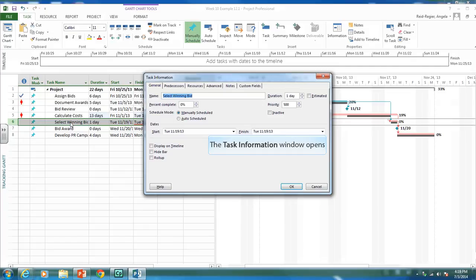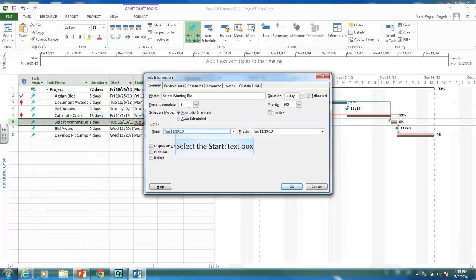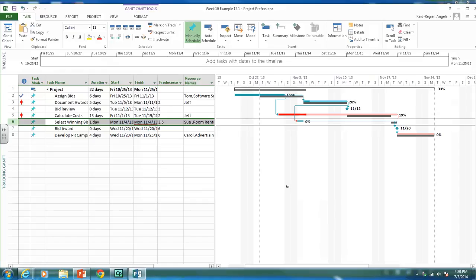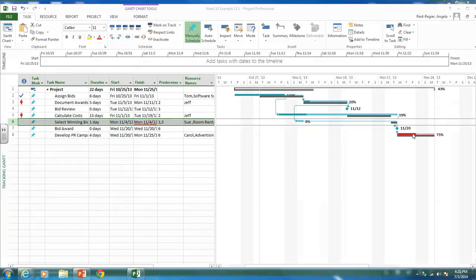Another way to status an activity is to enter the percent complete directly in the task details — for example, 5% complete with an actual start of November 4th. You can also click and drag the completion bar on the Gantt chart itself. So the different methods are: entering dates, Mark on Track, the 0/25/50% buttons, typing a percent complete, or clicking and dragging.